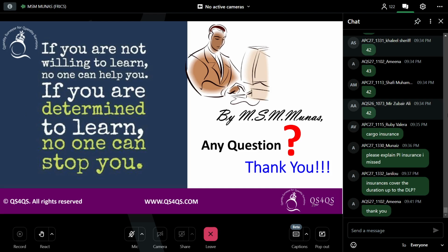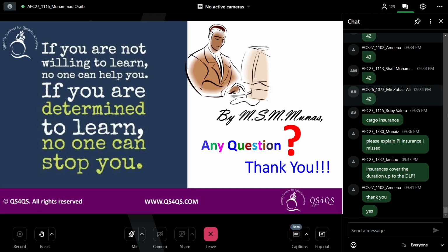Repeat again, what is that? The contracting company damaged her car, correct? Sometimes if the contractor claims through the CAR policy or the insurance for the property damage, the insurance company will request him to pay a fee that will be more than the fee she would accept to repair her car. So usually the contractors will come and say, just please take this money and fix your car, and that's it. Anyhow, he needs to recover that money from his insurance.